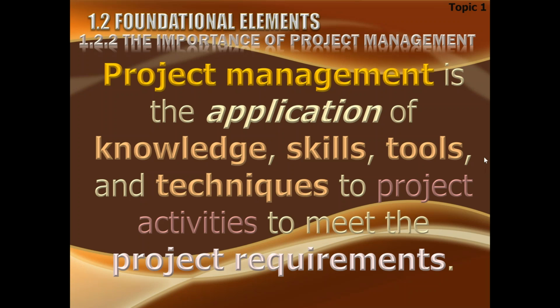So after having understood what the knowledge, skills, tools, and techniques are, the important thing here is you should apply the project management knowledge, skills, tools, and techniques only to the project activities and only for the purpose of meeting the project requirements. That is a very, very important lesson here. And this points towards something which is called scope. You should not be doing anything which is out of scope of the project. Only do that work which is in scope.